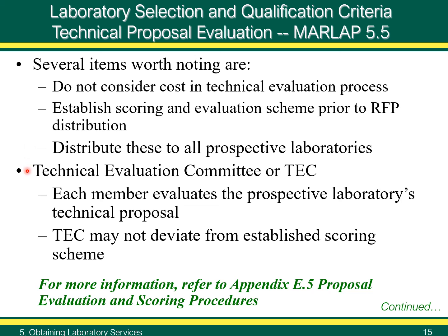The evaluation itself is performed by a Technical Evaluation Committee, or TEC. Agency personnel initially involved in establishing a new contract and initiating the laboratory selection process may consist of the contracting officer, who is generally administrative and non-technical, or the contracting officer's representative, who may be a technical staff person advising the contracting officer.